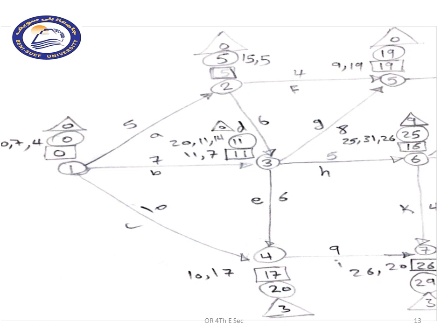Here at node number 1, at each time you will start with 0 time in the rectangle, and you will reach 0 time in the circle, and you will reach 0 time in the slack time. So when you start node 1 times, you always start with 0, 0, 0, like you can see.